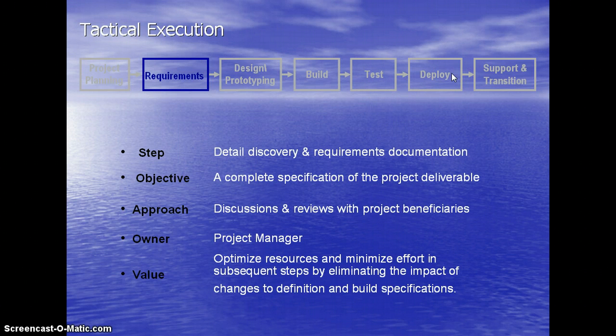Requirements. The specific breakdown is not significant, except that in each step, specific artifacts and deliverables are defined and required, and are typically reviewed by some quality or compliance organization or function. In order to maintain that active portfolio for demand management planning on a consistently current and estimate at completion basis, time tracking would be deployed at this phase and task level within each step.